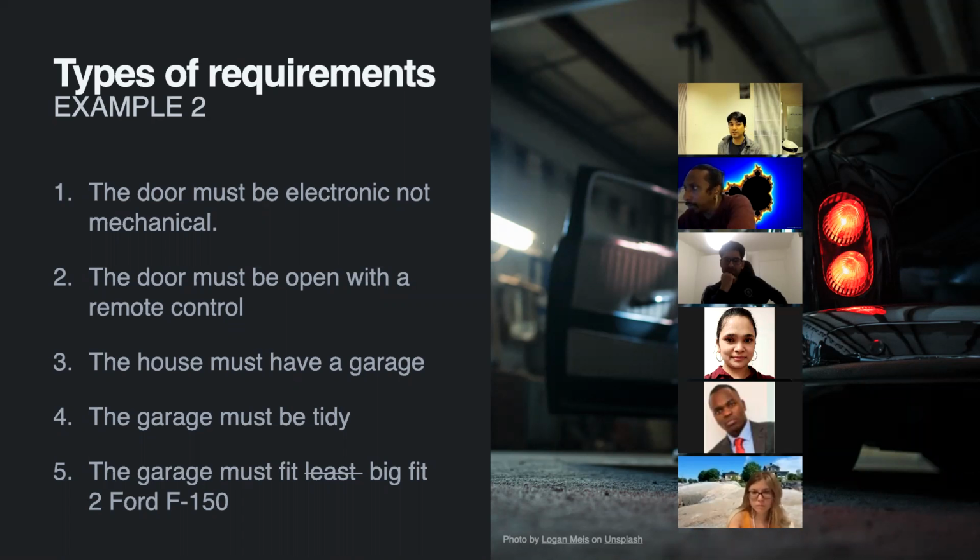Just like Abbas mentioned, we don't know to which part of the mansion this door belongs. So now, in addition to the functional requirement, we need to put the ID of the business requirement it belongs to, so we can see the connection. Now we'll make an example with a table so you can see it in detail. But now you can see that we need to put to which business requirement these particular doors belong.